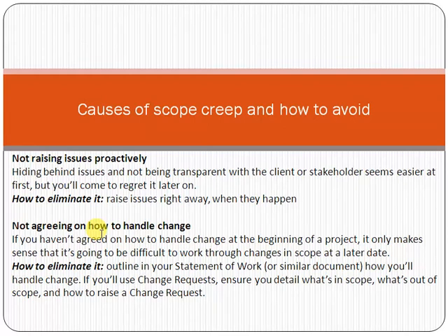So change request means that the change will be analyzed with respect to scope, time and cost: how much time will be required, how much cost will be required. With respect to all these factors, the change request will be analyzed and made accordingly, and after the change request is approved, it will become a part of the scope.